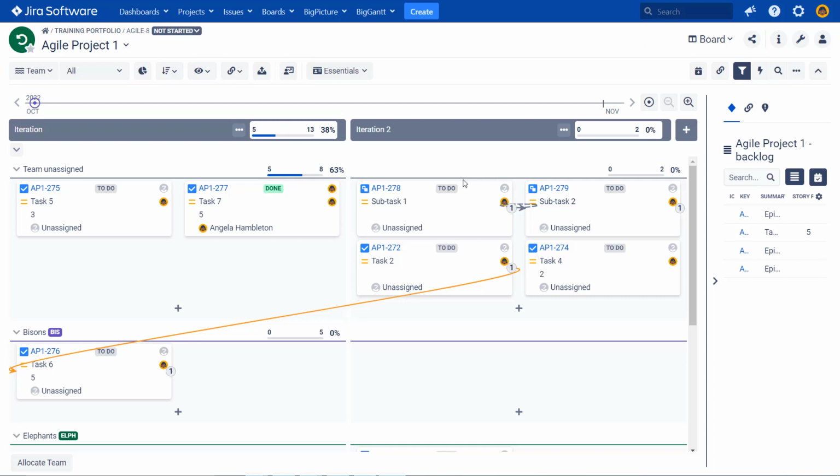Okay, so we basically did the setup for Agile project. So we have the main box representing our Agile project. We have boxes for our iterations or sprints, 2 of them at the moment. We can obviously add the next ones so that we can plan work for each specific iteration.